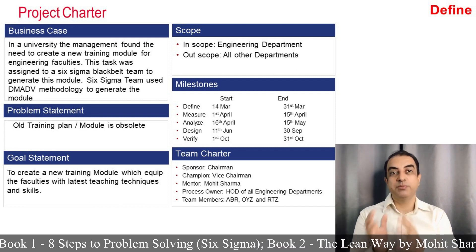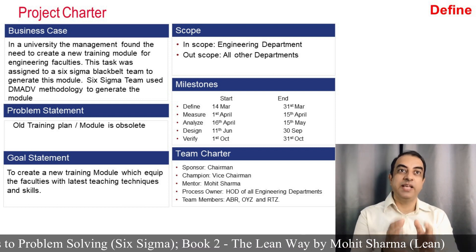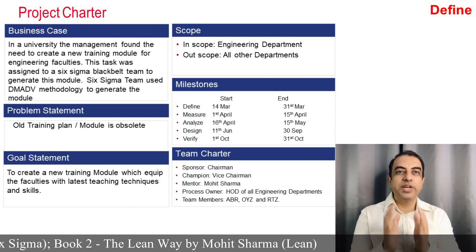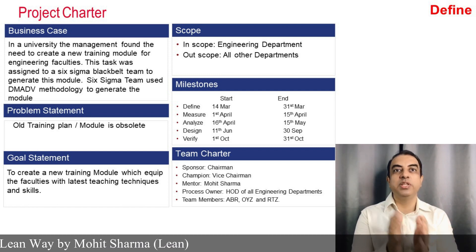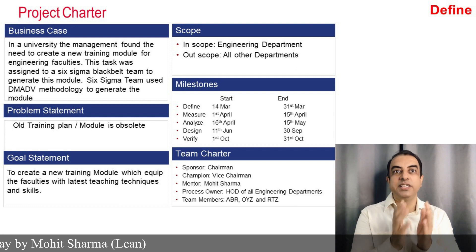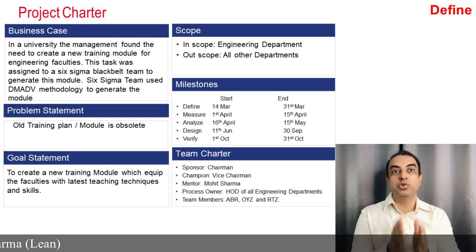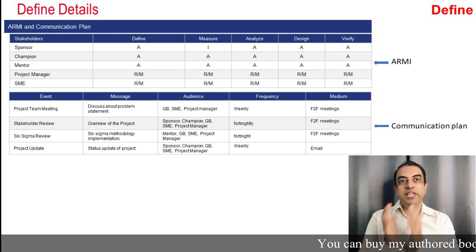We have the chairman as the project sponsor and vice chairman as champion of the project. The goal is to create a new training module which equips the faculties with the latest teaching techniques and skills by October 31st. The team created a RACI chart to define the roles and responsibilities of all the stakeholders in each phase of the project.